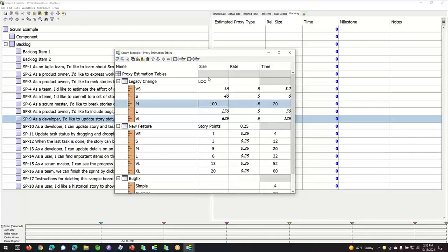And so from that, with just that little bit of information based on what our things have taken us in the past, the dashboard can help put together planning poker cards for you if you don't have a lot of data. Of course, if you do have data on work that you've done in the past, then you're certainly welcome to fill this chart in completely with real historical data that your team has collected, so that you know the numbers you're producing are estimates based on historical patterns.